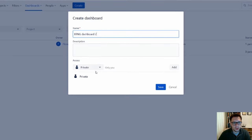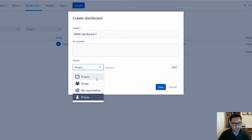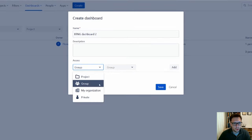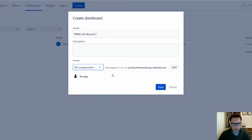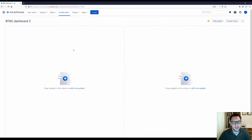Now that you've set the name, you can also determine who gets access to this. You can edit this later, but it's best to do it now. You can say private if you just plan to use it yourself, or you can use the dropdown and share it with either a particular project, a particular user group, or just with the whole organization. Remember to click Add before you click Save — that way everybody will have access to it.